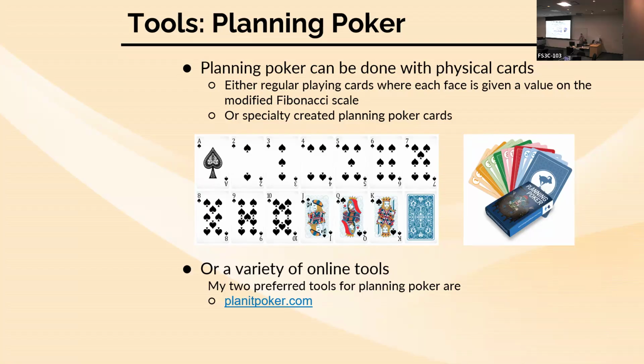A lot of the tools I see out there, like a Trello power-up that adds planning poker to Trello, don't keep the bid secret until everyone makes their bids. So you go into the card and see what everyone else has already bid when you're making your bid, and that kind of defeats the purpose. You're not actually getting the conversation at that point. Now whoever bid first is leading everyone else's estimations. That's not necessarily going to work. So this is a very good one. I like this one a lot.